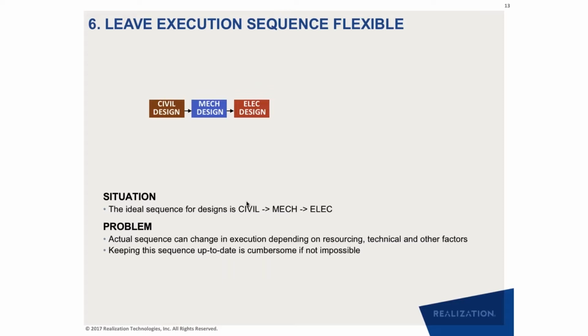So the other side of this is that oftentimes in execution, exactly when I need to have things done needs to have some flexibility. Let's say I'm in a construction and I need to do some civil design work around the grounds and structural, these kinds of things. Then I have the mechanical design that has to happen, and finally the electrical design. Intuitively, because of the way I'm going to build this structure, I want to do my civil design first so the civil can start. Then I want to do my mechanical design because they're going to come in afterwards to do the structural building. And then finally my electrical is going to come in once it's all framed.